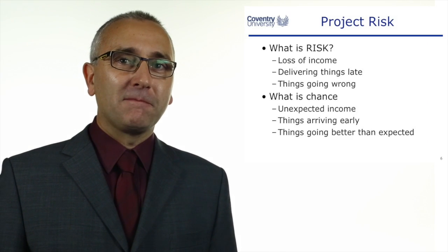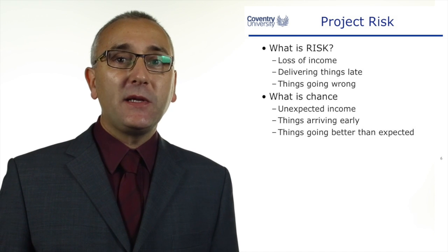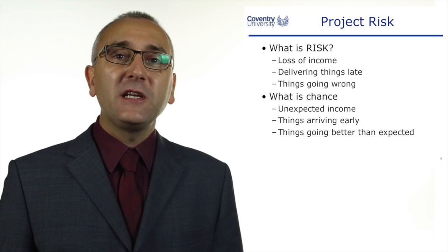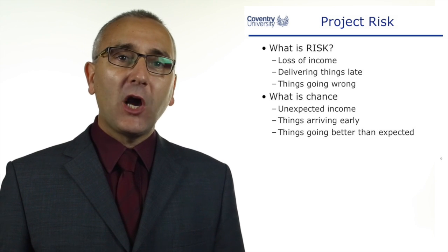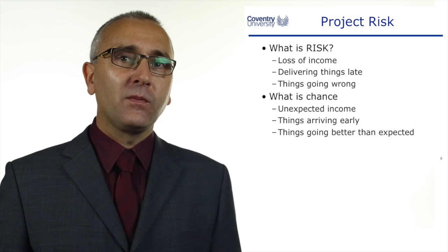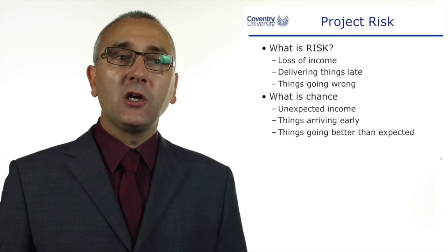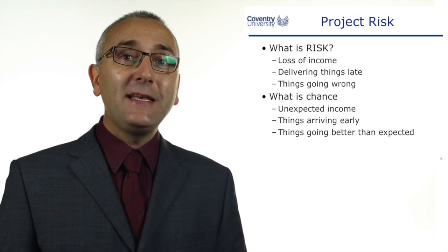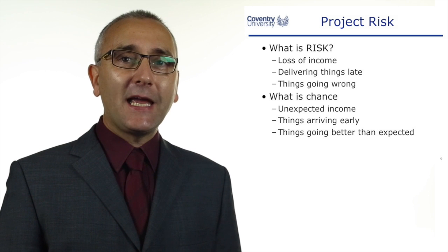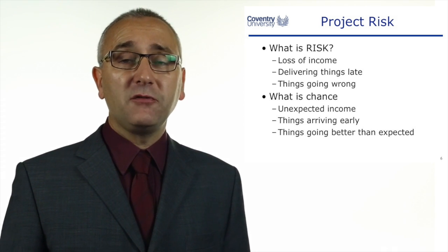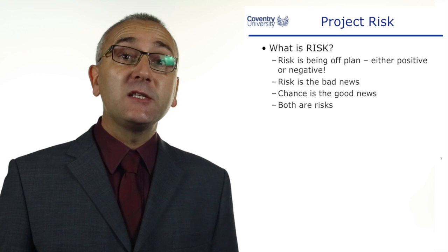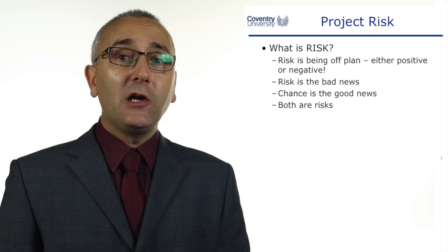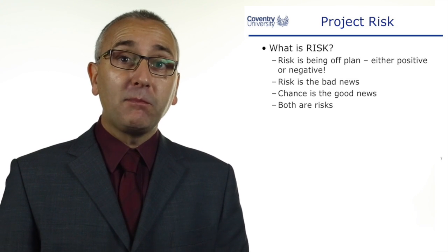So what do we mean by risk? The easy things to think about are being late on your projects or going over budget — things going wrong. But actually, there's a risk that things could be early or you could be under budget; things could go better than you expect. The way we use the word risk and chance in the English language, we usually use risk to mean something negative — bad news. There is a risk of a delay on the motorway. But we never use the word risk for good news — you wouldn't say there is a risk I will win the lottery. So my definition of risk is being off plan.